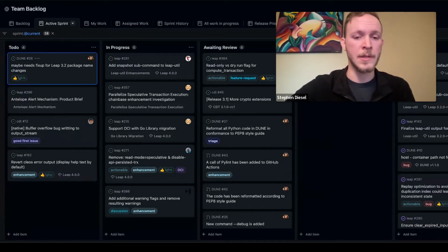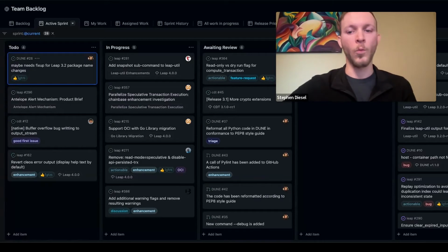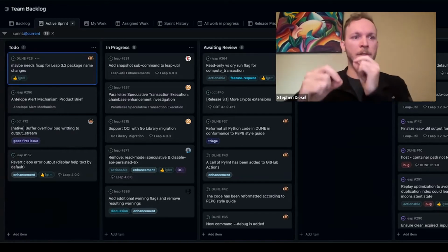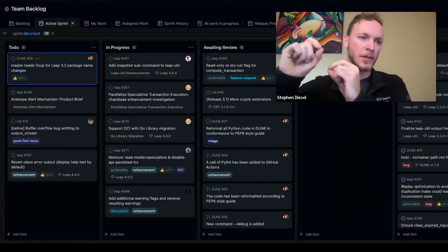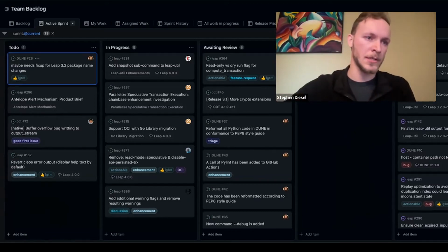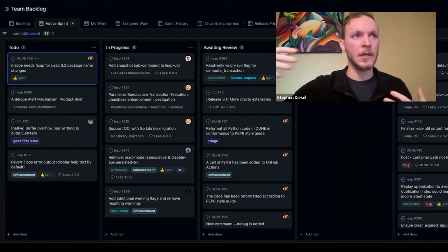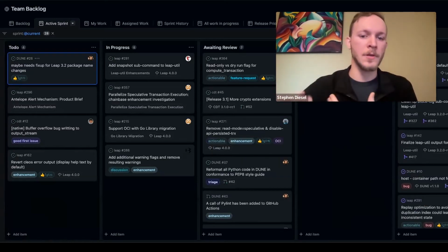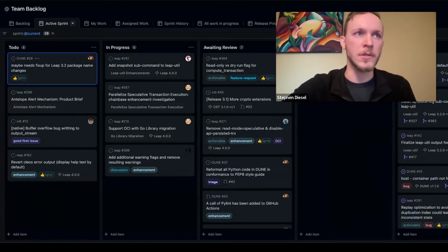One such example is that a next evolutionary step that I'd like to introduce is a story pointing convention. Right now, it's much more gut feeling around what we feel we can tackle, and we've been quite successful. But again, it's those baby steps to ratchet up each piece of the process along the way, and that's a very natural next evolution here. And meeting from the other side, once we get some of those rolling velocities, if you will, we'll be able to start tying that back more clearly towards cost.